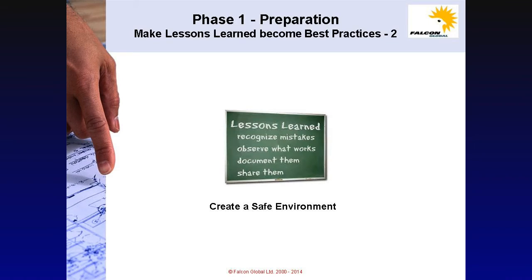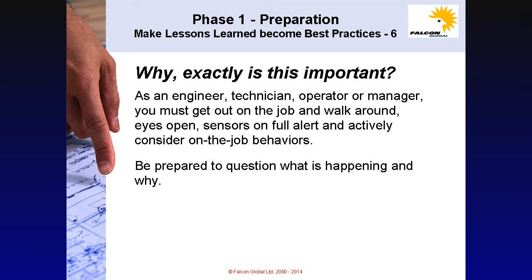And finally, ask some questions. What, when, who, why, how, if, and so on. Bring these together. Analyze and assess them, perhaps in a database, perhaps informally, amongst the team. Document the lessons learned. Do not discard any of the possible lessons learned at this stage. Make sure on completion of the lessons learned that these are added to the risk assessments that the commissioning manager and his team will put together as part of the overall risk assessment process for the project.